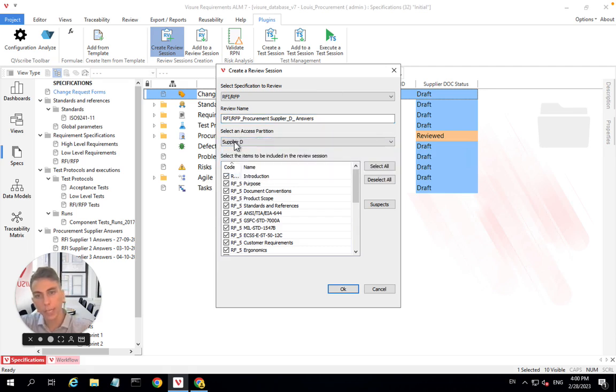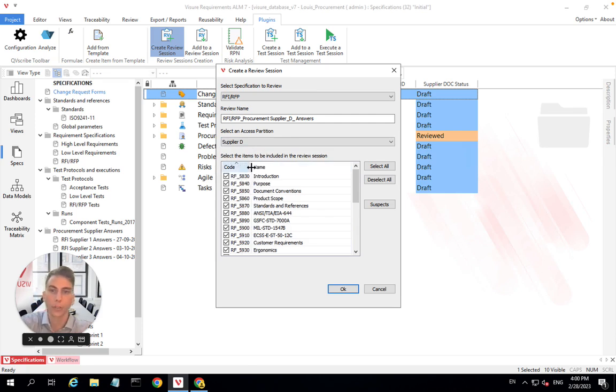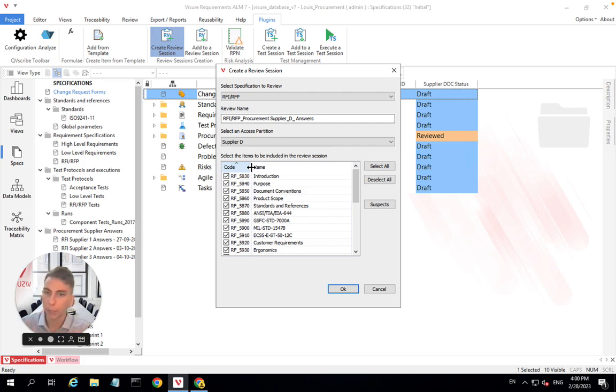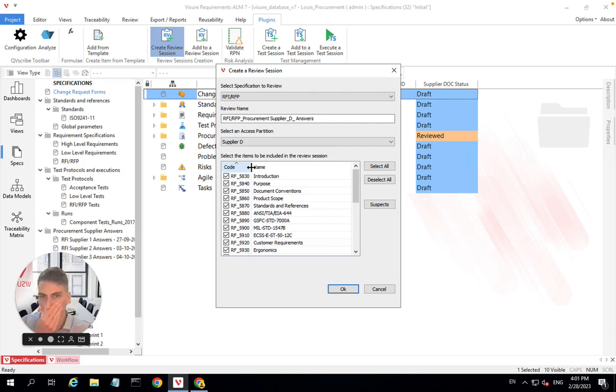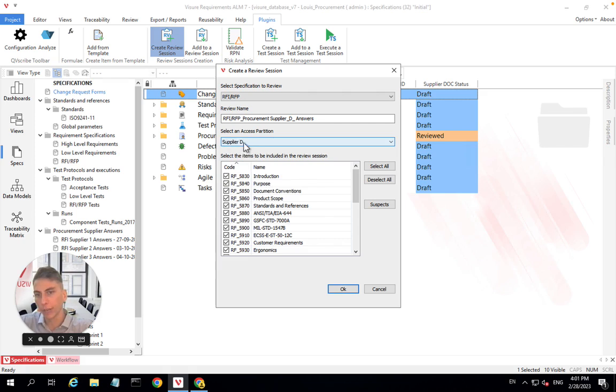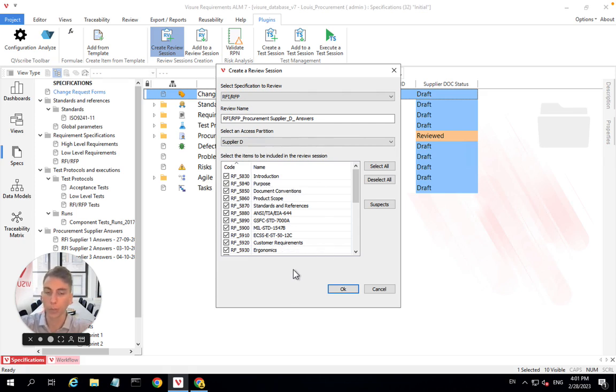When I select supplier D here, I'm basically making sure that only supplier D will have access to the answers of supplier D, which makes sense. But it basically means two things. Firstly, supplier D will be able to give his answer and his answers will be private. That means only him, like supplier D, and us, project managers, will have access to it, not the other bidders. And that also means that supplier D will not have access to anything outside of this access partition. So that would be the other suppliers' answers.